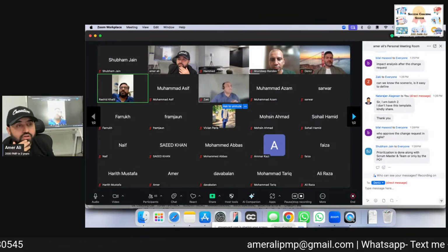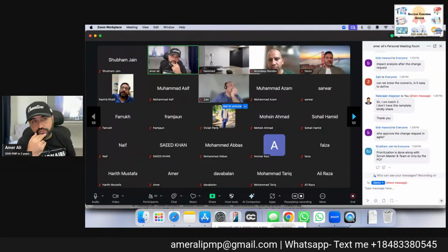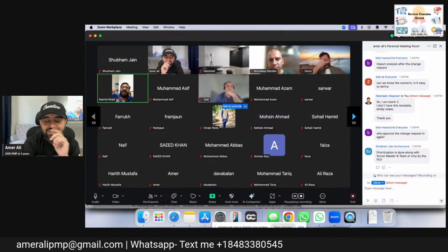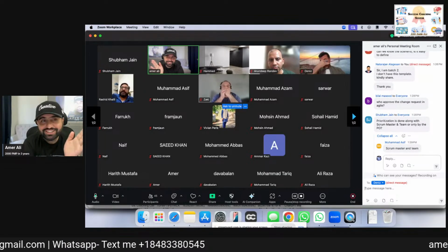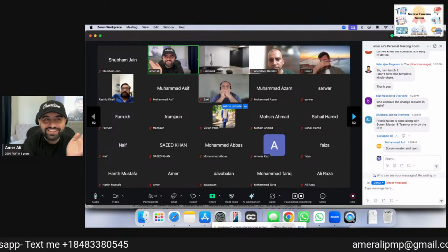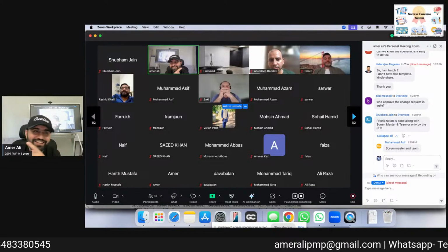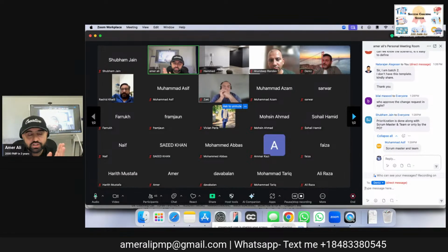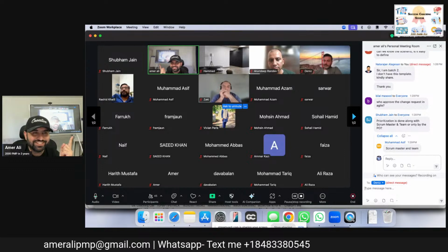You say no, go to change control board. I can look into that, but I question it. I think his project is hybrid, but the phase we are doing is agile. If you think that project is hybrid, then go for the change control board. If you are 100% sure it's agile, then don't go to change control.